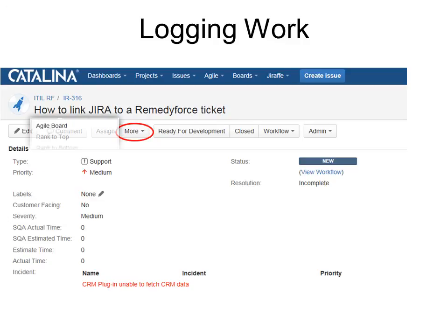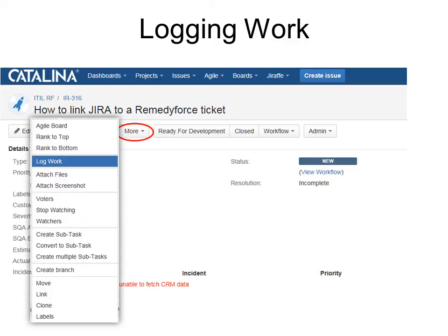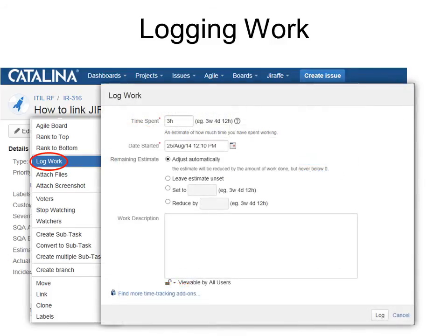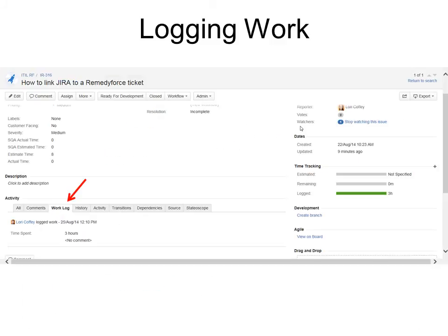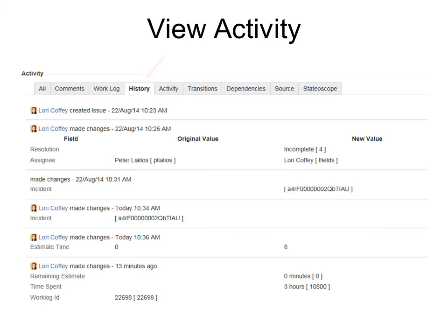If we go back to our more tab, we have the option to log work. So when you go in there, you can actually say how many hours you spent on the task. Then you can see it down in work log in your activity and you can see that it's been logged on the time tracking chart.